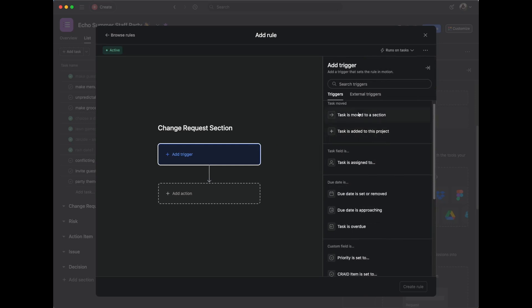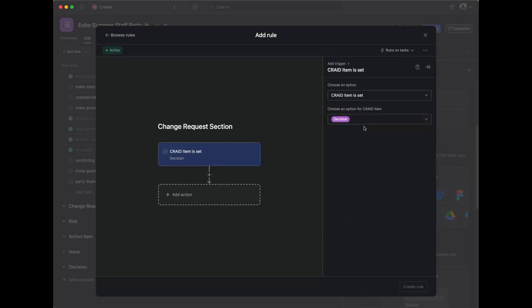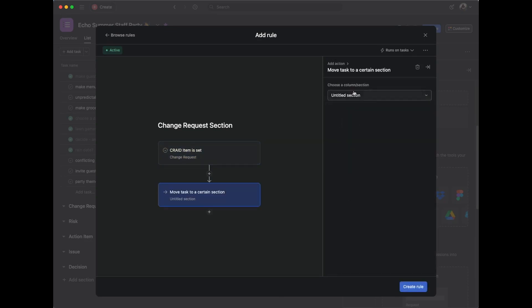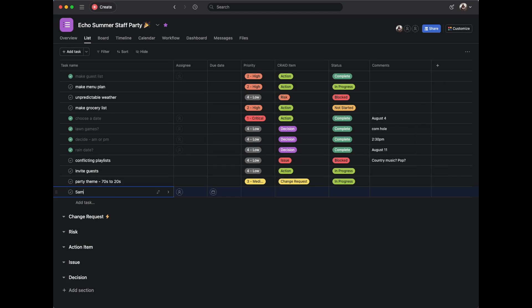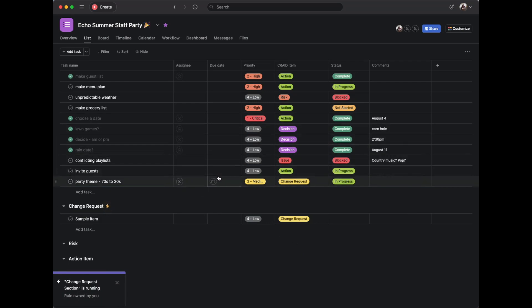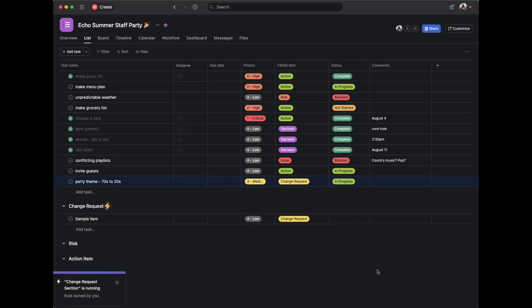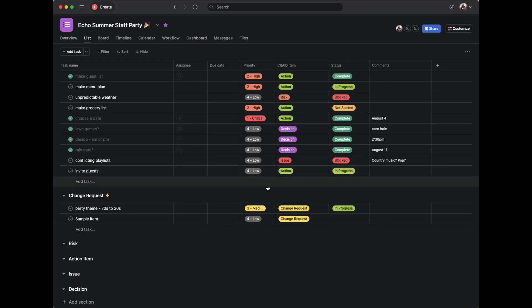I'll create a rule so that when an item in the list is assigned a CRAID item type, it's moved into that section. I'll go into Customize, add a rule, create a custom rule, and call it 'Change Request Section.' The trigger is when the CRAID item custom field is set to 'Change Request,' and the action is to move the item to the Change Request section. To test it: I add a new item, set it to low priority and Change Request, and it automatically moves to that section.